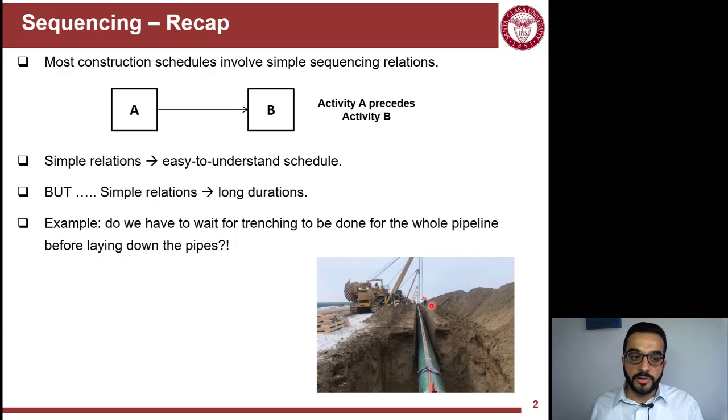If you think about it, this is a lot of waste, right? Waste can be time. It doesn't always have to be material. So wasting time by waiting for all of that trench to be excavated till the end, to be able to start laying down pipes from the beginning. So you can see the point that this simple relationship will result in long durations.